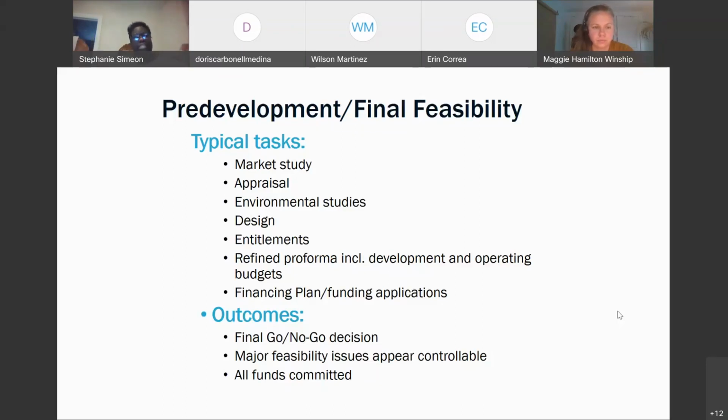Even if it's still an existing structure, they want to take soil samples. When you apply for the environmental study, they're going to ask you, are there any tanks nearby? So do you have a 7-Eleven nearby where you can get the tanks for your grill? Those things matter, because if it was a fire or there was an explosion, they want to know how far that is from your site. Also, in some environmental studies, you have to do a noise study.